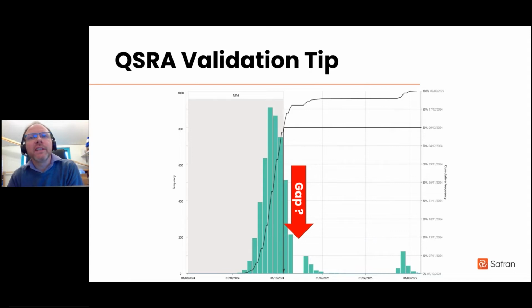And of course, the advantage of Safran Risk at this point is that you can then edit the activity calendars directly without needing to re-import a new version of the schedule. So if you wanted to run a what-if scenario, where you could challenge the assumption that a non-working period needs to be there, then you can compare that output with the official output, demonstrate it as a potential opportunity, or simply remove it if it's a piece of legacy information that doesn't need to be there anymore.